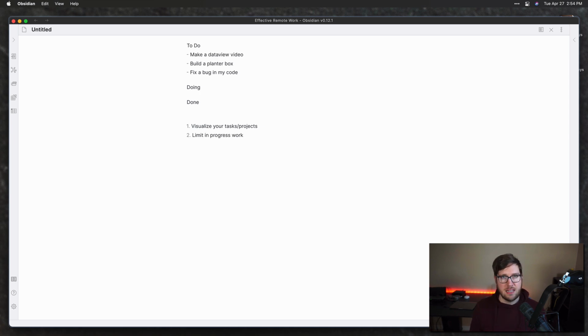This is the key focus, I think, for personal Kanban: in this doing column, you probably don't want any more than like 3 to 5 active items at any one time because you can only juggle so much. Your mind can only handle so much. If you start doing more than that, you really start veering into multitasking instead of focused work. If you keep your doing column to like 3 to 5 items, you're doing really well.